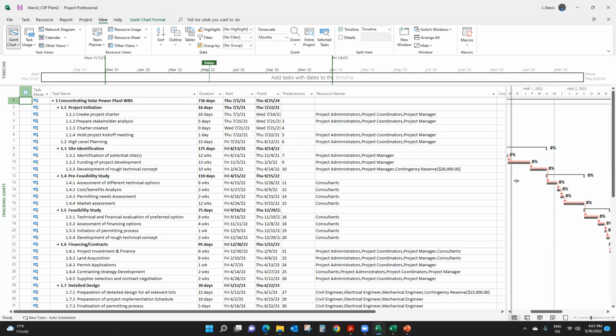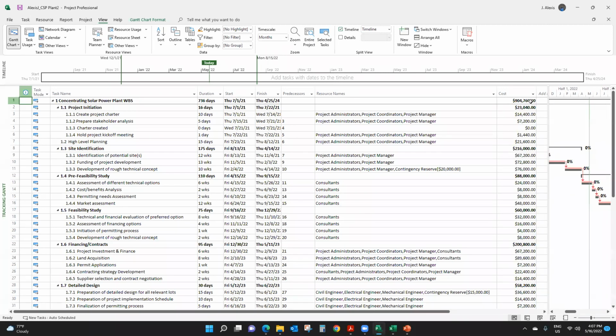You just need to make sure you find the total cost of your project and take 10% of it, right? And right now, I know this money has contingency reserve included in it. You see what I mean? Because I know the total cost of my project before I calculated the reserve amount.